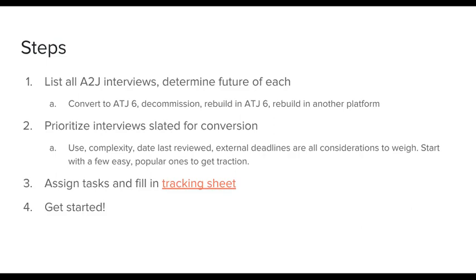So you have to weigh all of these factors, and there's no magic formula, but we recommend that you start with a few easy but popular interviews to get traction. So we started with our fee waiver. It's a fairly simple interview in terms of complexity. There's only a one-page form to fill out. There's not a lot of loops. There's not a lot of complex logic happening behind the scenes. And so we started with that one because it is very popular and fairly easy.